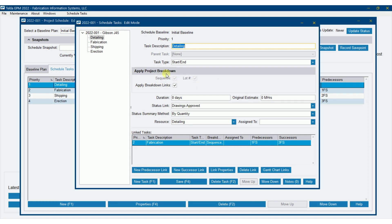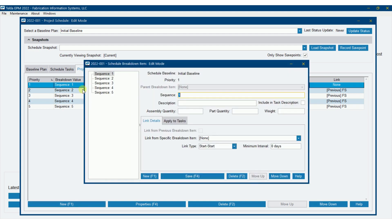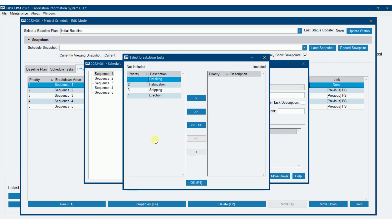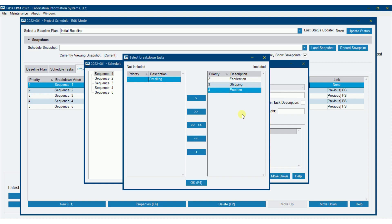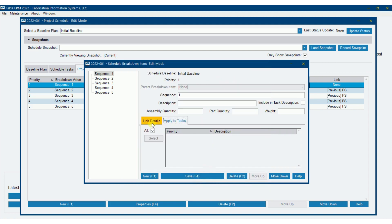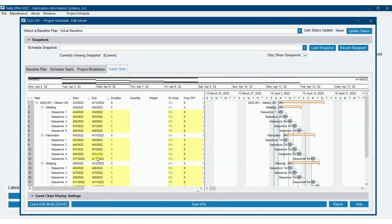If you decide you don't want sequences applied to a particular task, you have a couple of options: you can delete the breakdown item and change the setting, or back in project breakdown you can specify that a sequence only applies to particular tasks — for example, only fabrication, shipping, and erection — so sequence 1 won't be applied to detailing. I'm going to leave it applied to everything and save.